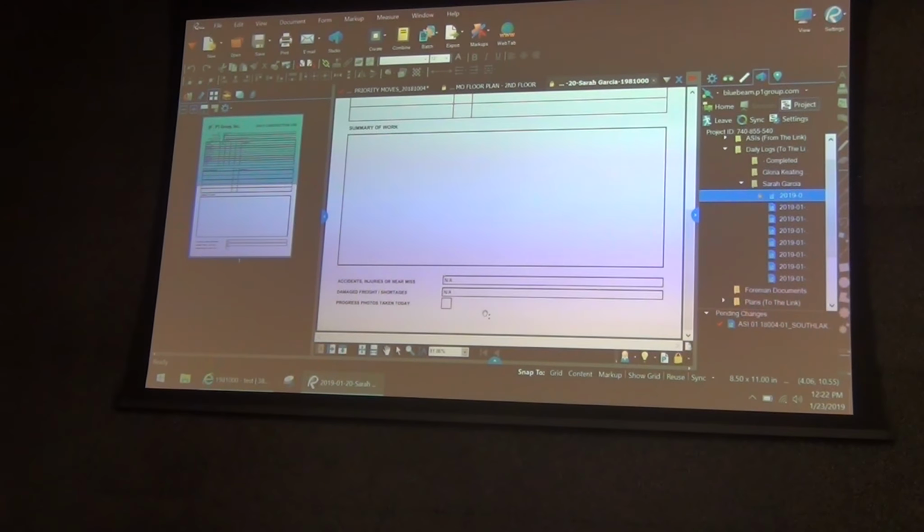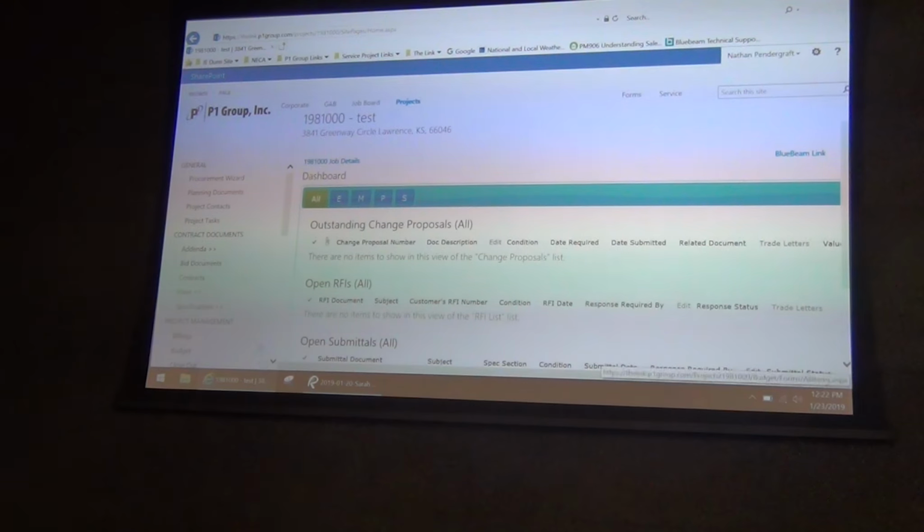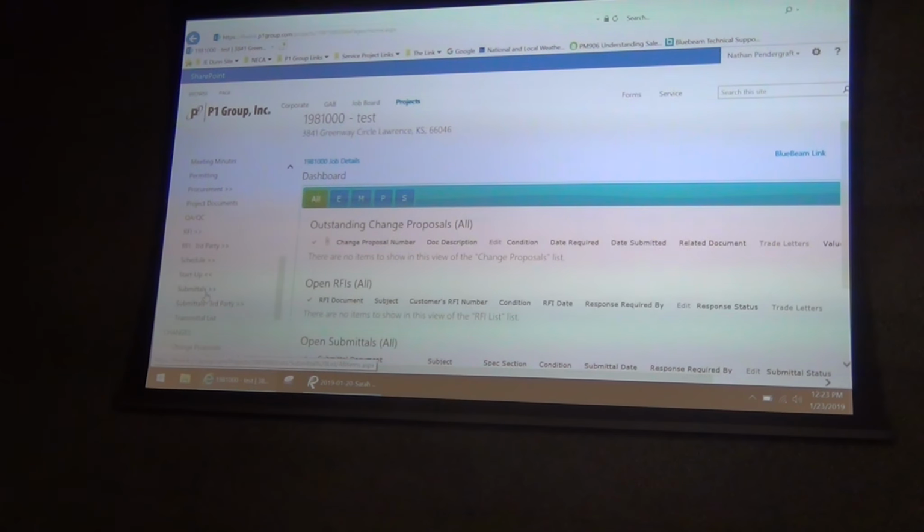How are you doing submittals and RFIs? Do you use the same workflow for that? We built wizards, we call them, for each of those processes. It originates in SharePoint, so it's like the other project management programs you've seen. You create a new RFI, it gives you the next number. It pulls from a global address book to get the contacts, and then in the end, it generates a PDF that you would then email upstream. As soon as it creates that PDF, that night at midnight, it pushes that out to the field so they can see the pending version. Once it's approved or answered, it moves into another folder and they can see the response.